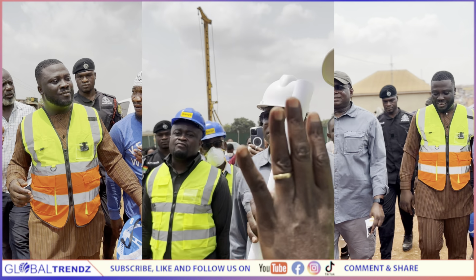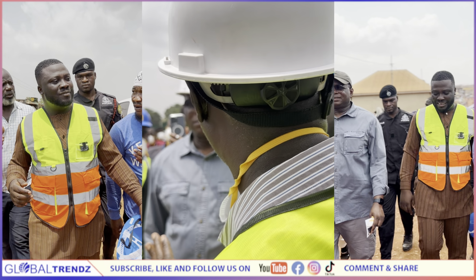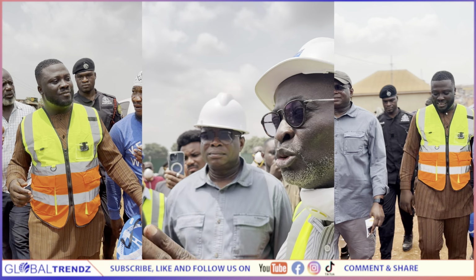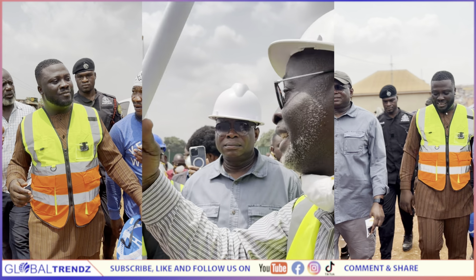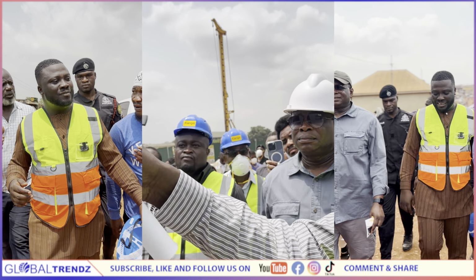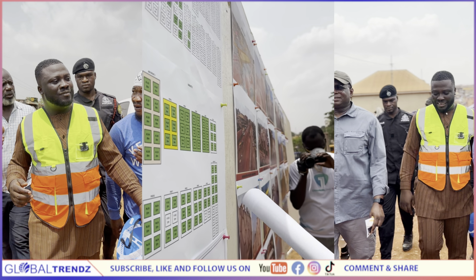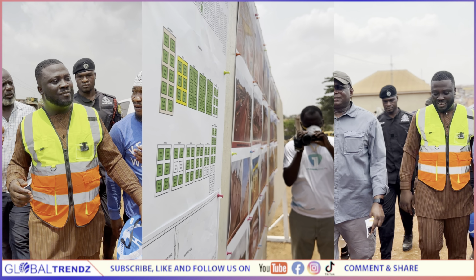The contractor's original plan was to concentrate on viaduct 2, which is from Oforikrom Suame to Kejetia. But due to difficulties in finding space to drill, the contractor then decided to turn his attention to wherever he can find space to drill. And that is how come they started on viaduct 1. So for viaduct 2, out of 84 piles, they have done 74.